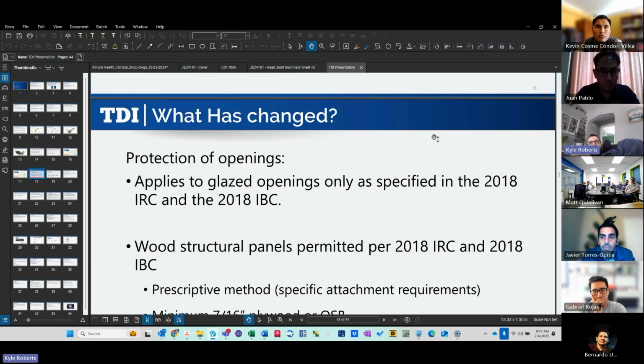I'm like, I agree. And then the GC said, I talked to the TDI people, and the TDI people said it's this. I said, you need to talk to the TDI people and confirm with them and fight with them if that's what you want. Otherwise, what TDI says is going to have to go. Even if it's a cost impact on the project, they're the authority on what glazing makeup we can use.